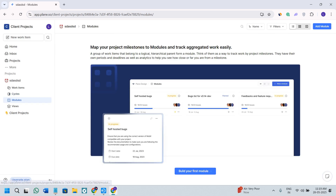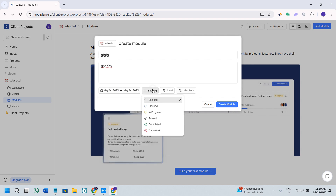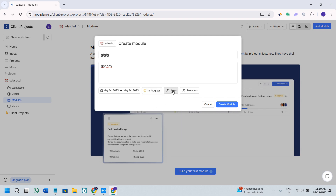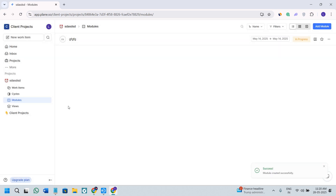Next, we have the Modules option. If you click on it, you can build your first module by clicking on the build module option. You need to give it a title, a description, a start date, an end date, and select the status — backlog, in progress, or completed. This module is important if you are assigning certain tasks to your members, so you can track whether tasks are in progress or completed. You also have the lead option, to specify who is leading the project and who the members are. Click on create module and you are done.